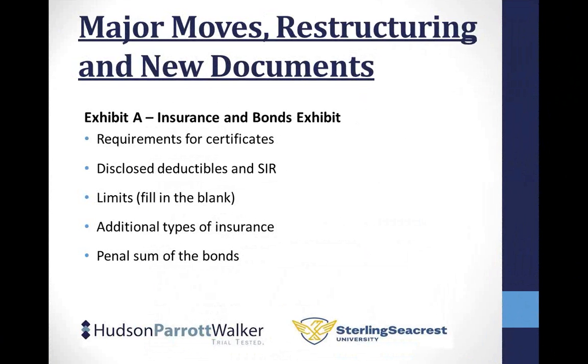They've changed. This is a change. The old document that's in use currently references a 30-day notice of cancellation. In the certificate, this has been a real controversial area of insurance, particularly in Georgia. There's been a ruling on this. Most carriers will not, the certificate does not allow for that anymore. The publisher of the standard certificate and the insurance commissioner have made decisions on that, and so you can get an endorsement, but that's not universally offered, and so they've recognized, I think, the practical realities of the marketplace, and they've changed that. So now it doesn't speak to that 30-day notice of cancellation.